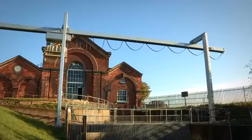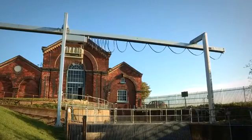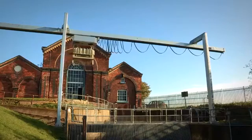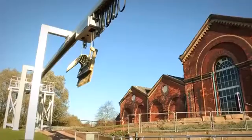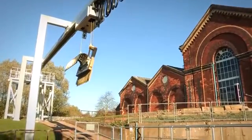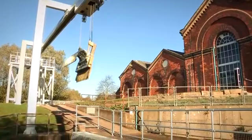The installation posed quite a few problems because we didn't know the riverbed situation. We had to get divers to come and survey the riverbed before we could install. Once that was complete we did all the civil works, civil levels, and obviously installed the unit itself.